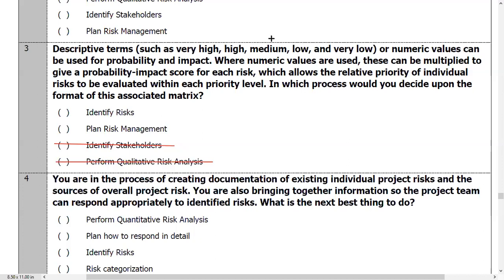For example, I like the one the risk doctor gave me. He said, give me an example of when you've done risk management in an organization. So I told him about a divestiture that I did here in Arizona. It was a divestiture of a semiconductor company into another that was swallowing them up. And he said, well, what was the overarching strategy? And I said, well, we needed to get to management as quickly as possible any time there was a threat to the overarching objectives of the divestiture. And he said, yep, that is the risk strategy.